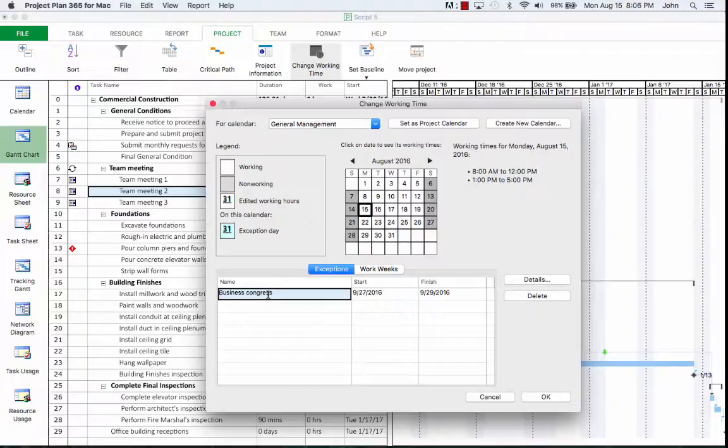So here we can see that the Congress takes place between the 27th and 29th of September. So this way, using the resource calendar, we specified 3 days of time off for the resource as exceptions for the individual resource. Now if we look in the calendar for September, we'll also see in this case the days within the time period being marked as non-working.